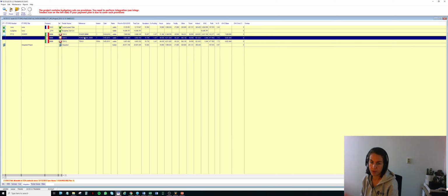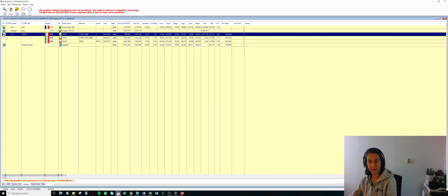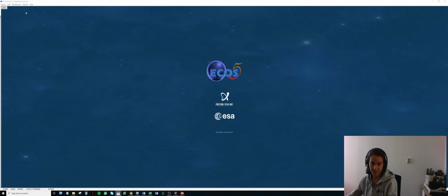I have, again, a lot in my BCK directory, so I may have plenty of examples. But in this case, what the screen tells us is that there is a tender answer as part of our ITT 12. So in order to perform the integration, it's exactly the same as with replacing the budgetary subco amounts. We simply need to select and click on Integrate Tender.